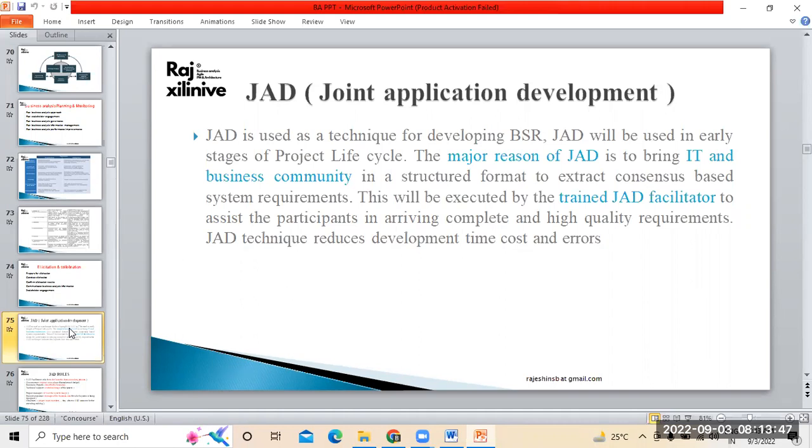That's the reason why before this I told you about stakeholder identification. Before you conduct the JAD session, you have done stakeholder identification, analysis, and management. So when you conduct the JAD session as part of requirement elicitation in the second step, you are inviting the same people, not other people, whom we have identified. On what basis did we identify them? On two bases: one is power, second is interest. Because power equals decision making, interest equals involvement.